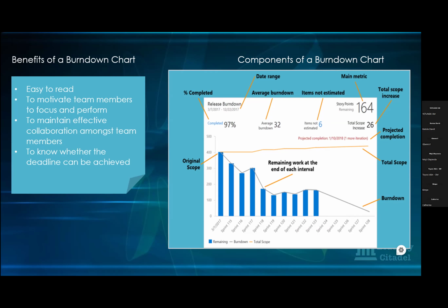If you've put all that, you've met the BA's definition of done, isn't it? The first one, and then you go to the next one, and the developers must put their coding. The coding must be in line with the right standard. It must be reviewed by the tech lead. You now have to form the one for the team, following a process. This has to be done first, before this is done, before this is done.